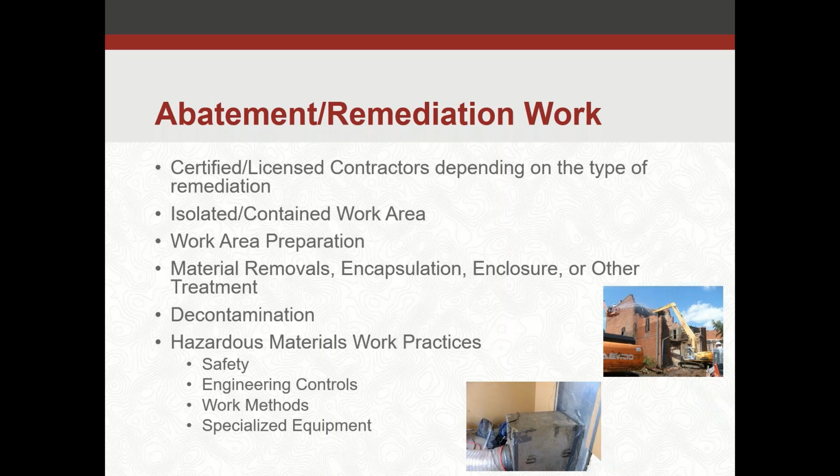Other scenarios, say you're removing petroleum contaminated soil, there aren't any specific certifications required for that, but you might want to look at whether you have an experienced and knowledgeable contractor in that field. Maybe require HAZWOPER or similar training, to know they've been familiarized with how you address emergency response activities. So even if there isn't a certification or license required, you might want to specify something for experience.